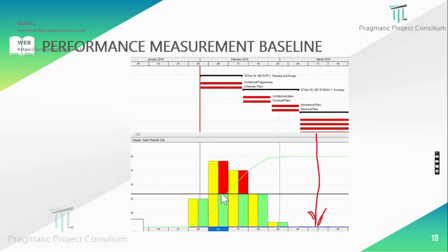Here in this schedule, we have fully loaded the resources, and we have also discussed this red alert, where the resource assignment needs to be revisited, and we have to level it. Whether it is an increase or decrease of the activity duration, all of that we have to consider.